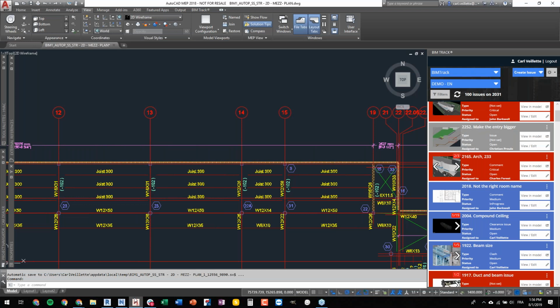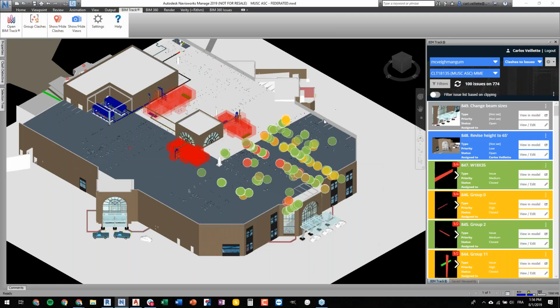We went in and saw, all right, they give you tolerances, right? And you say your red comes out of tolerance. So we actually went to more of, hey, we're going to give a really big tolerance, and the things that actually fall really far out of there, we need to go look at, because that means that it is off from that 1.5 inches that we were supposed to be in. And that's where we went back. But once again, it wasn't ever precise, it was just structure. We had exterior walls for architectural, but that wasn't really necessary at that point.